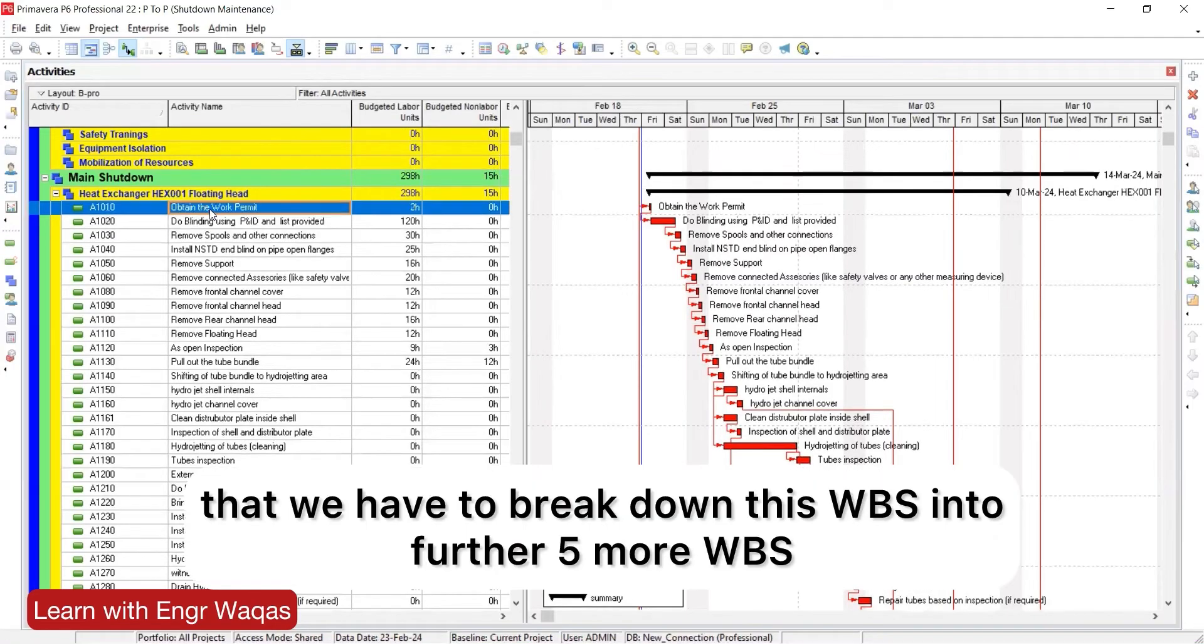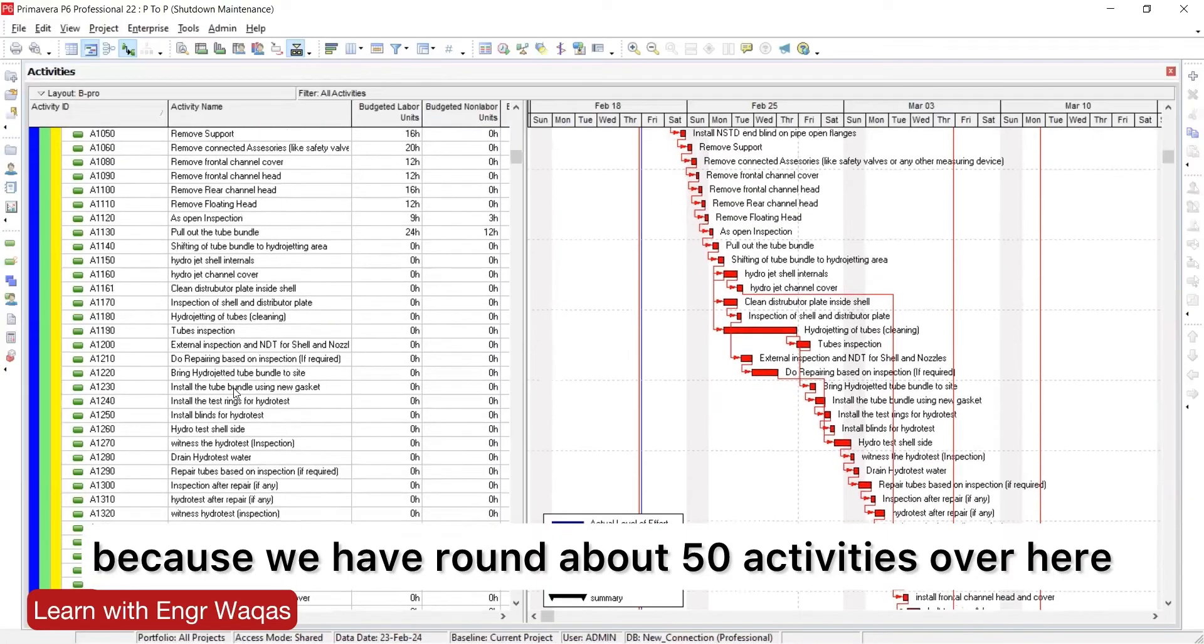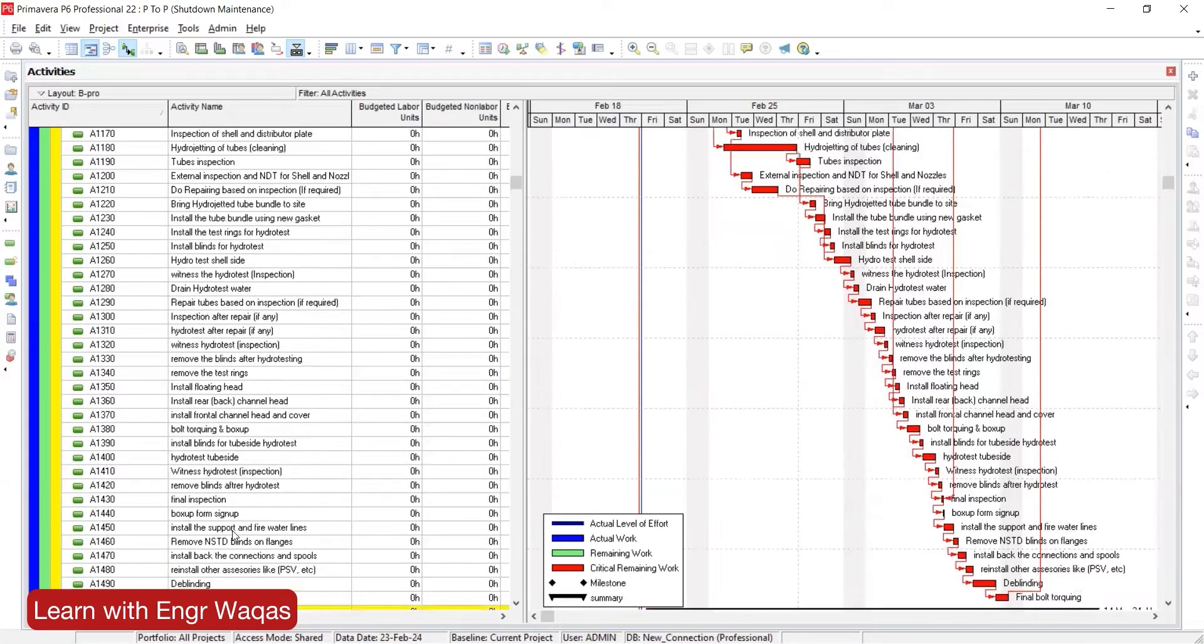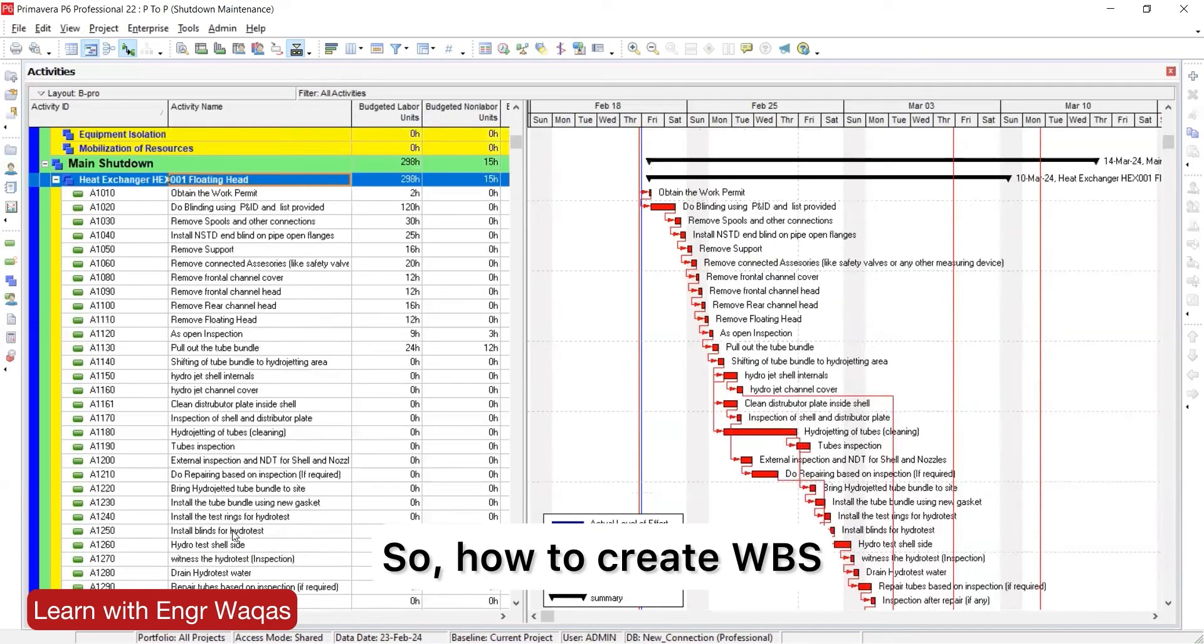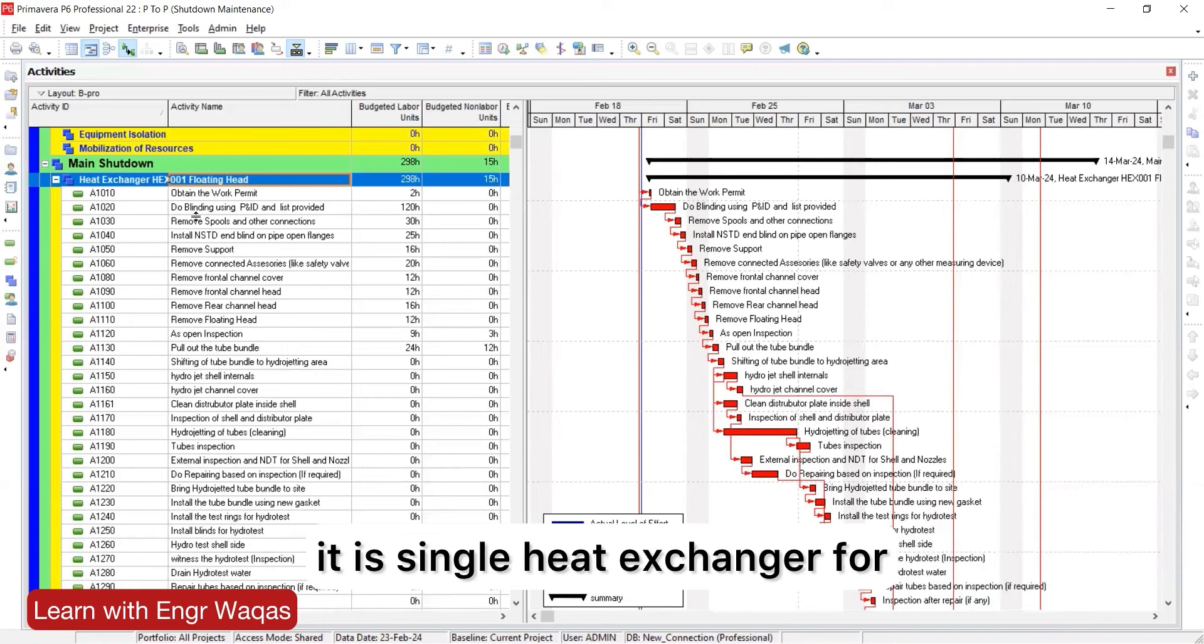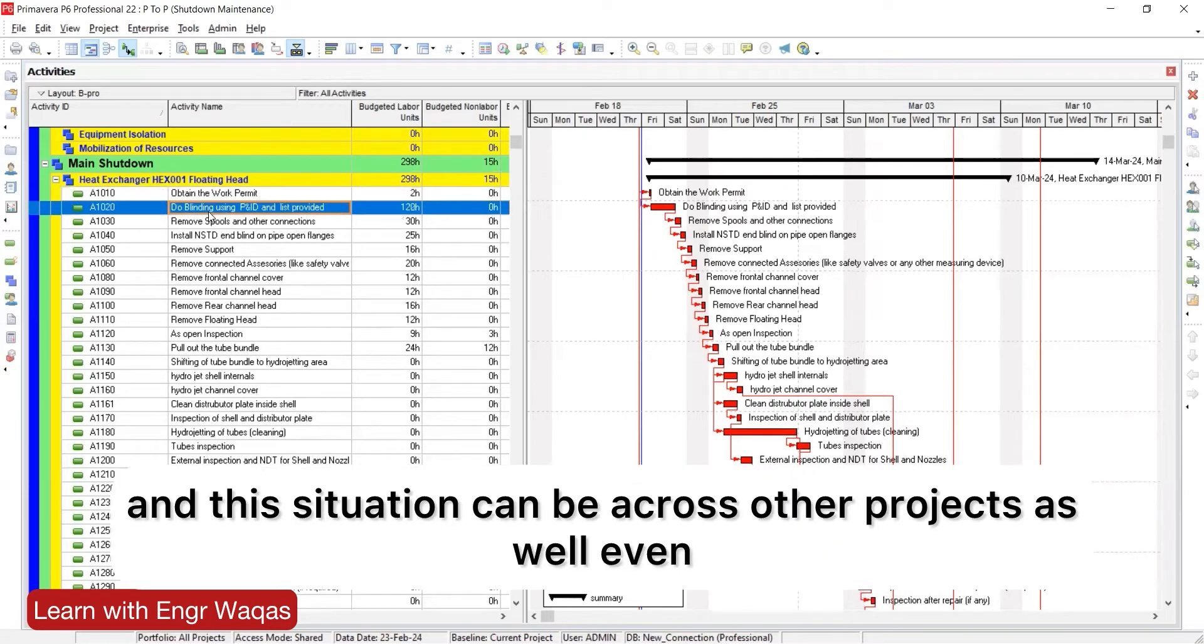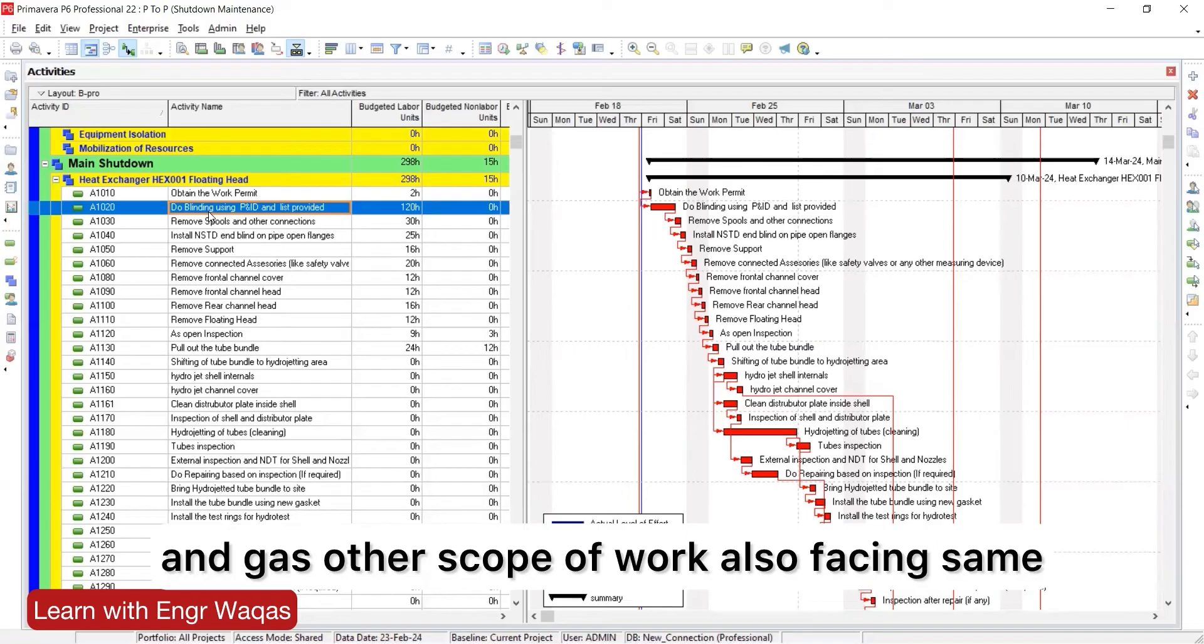We have to break down this WBS into further five more WBS categories because we have around about 50 activities over here. So how to create WBS? We can't make heat exchanger one, heat exchanger two, as single heat exchangers for all activities. This situation can be across other projects as well, even if you're a civil engineer, architecture engineer, petrochemical, working in oil and gas, or other scope of work.